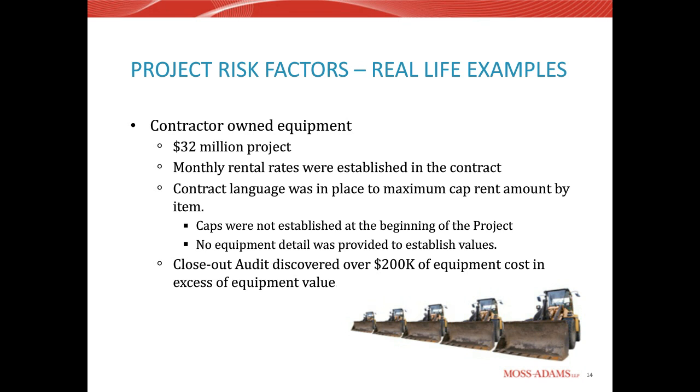The beginning value should be the value of the piece of equipment when it entered the project. So for example, a lot of general contractors, if they're bringing a forklift onto a project, that forklift might be 10 years old. It might have been used on previous projects, that's not a problem.